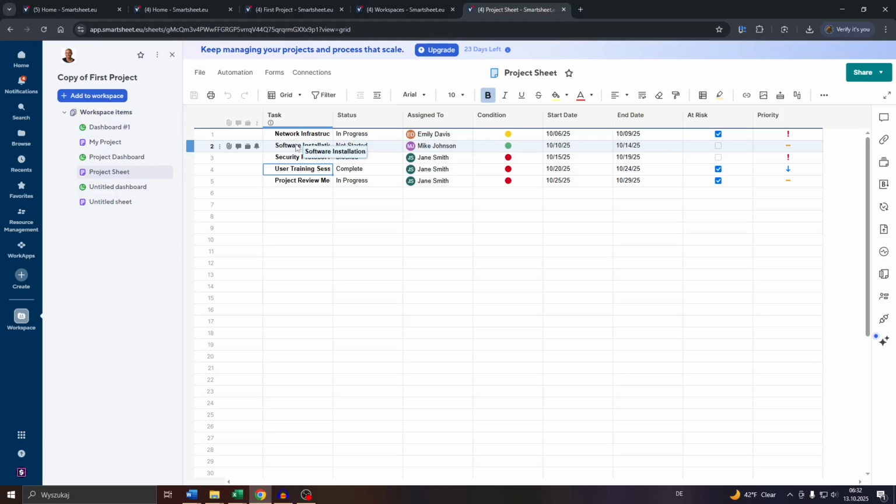So there are two different ways how you can create subtasks. You can, and that's option number one, make one of these tasks listed here the subtask of the task above and make the task above the parent task of the subtask below. As you can see at that moment, guys, these 5 tasks don't feature any subtasks and there are no parent tasks, but you can convert each one of these into a subtask of the one above.